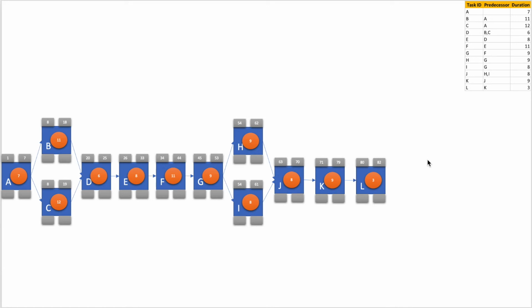So we have calculated the total duration of the project, assuming that we start on the first day and we carry on the activities in the earliest possible time which is possible to execute the activities. What we have done basically is that we have executed the forward pass. So in forward pass, we calculated the early start and early finish of all the activities. Now once we have the early start and early finish of all the activities, we know that this particular project will take 82 days. I consider that, supposing this project takes 82 days, and I start calculating backwards.